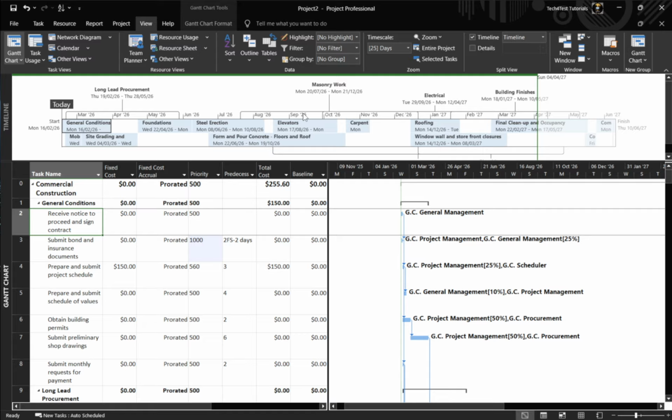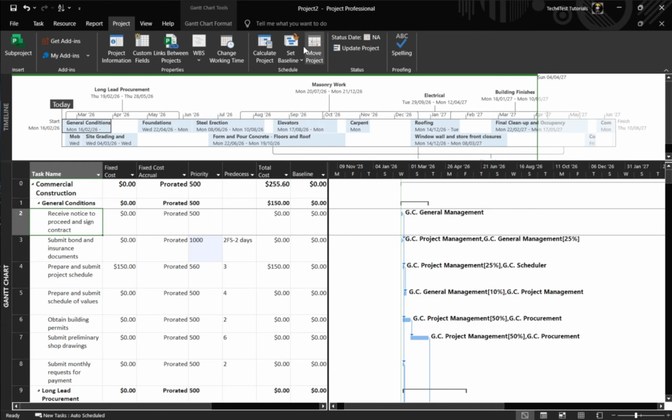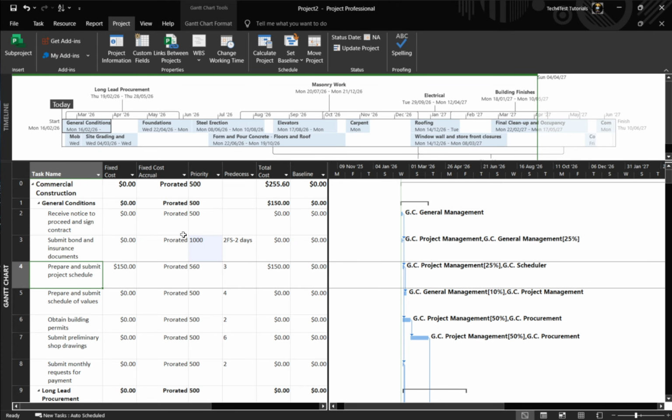Now, let's connect this to scheduling behavior. Priority becomes active when you run resource leveling to fix overallocations. Project weighs priority alongside float, links, and constraints to choose which tasks to delay or split. High priority tasks tend to stay put. Lower priority tasks are the first candidates to move. Across multiple projects, Project also considers each project's overall priority to decide which plan should shift first. If you don't level, changing priority won't alter dates.